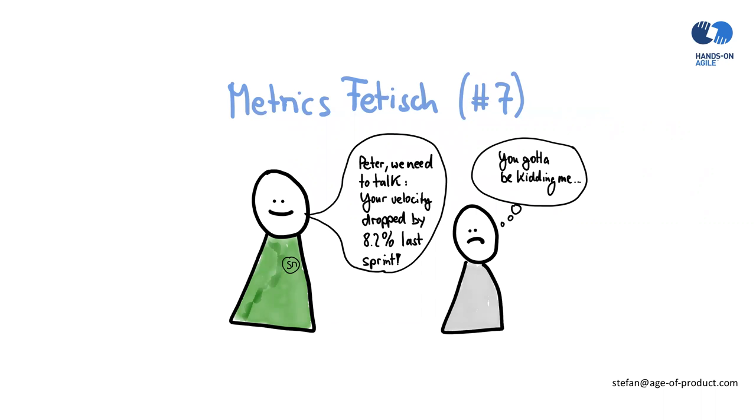If the team considers a burndown chart useful to monitor progress toward the sprint goal, fine, then it's the job of the dev team to actually update the chart every day. However, if the burndown chart is solely maintained to track the output for reporting purposes to the engineering management, that's an issue the team should get concerned with and address in the retrospective. It's not intended to be that way.